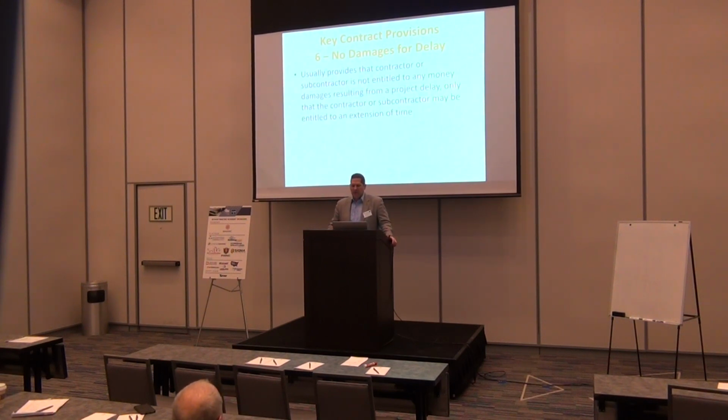So no damages for delay is a clause in a contract that basically says that the contractor or subcontractor is not entitled to any money that results from a project delay, but you get an extension of time, okay? And sometimes that's okay, and sometimes that's all you need is an extension of time, and you don't need really any more money. Sometimes, maybe most of the time, time is money.